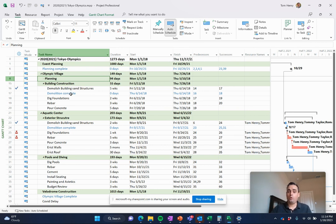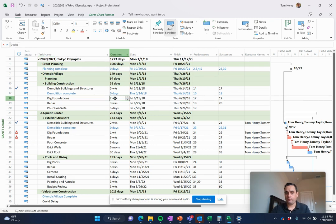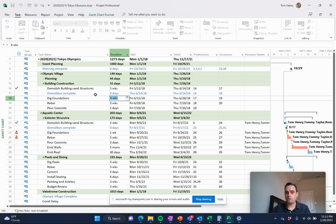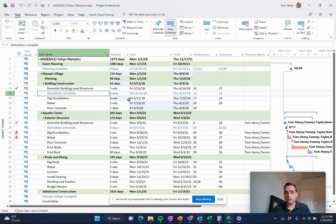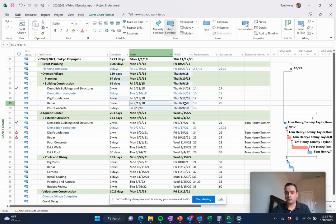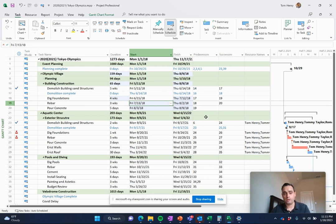Those dates are always flexible. So, for example, if I find out it's going to take me longer to do the foundations, instead of two weeks, it's going to be four. I can push that out and it'll actually dynamically update all of the other tasks on my project.